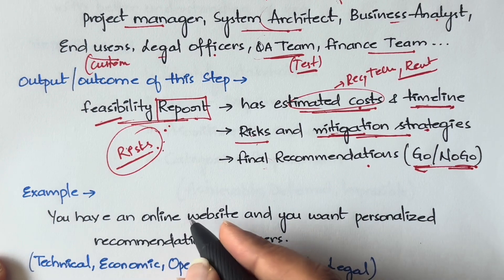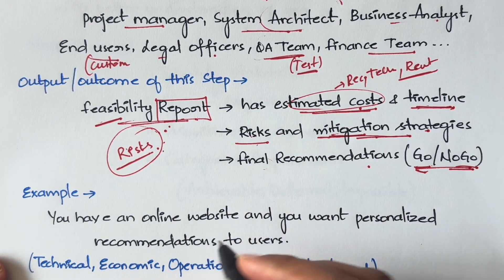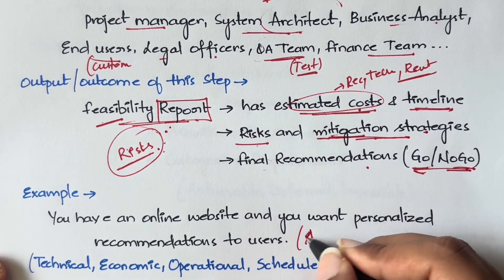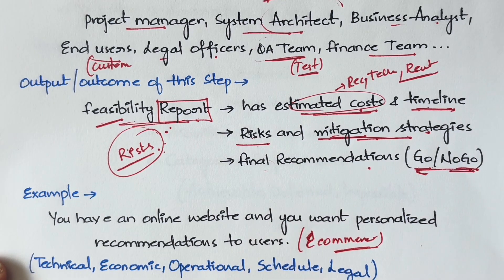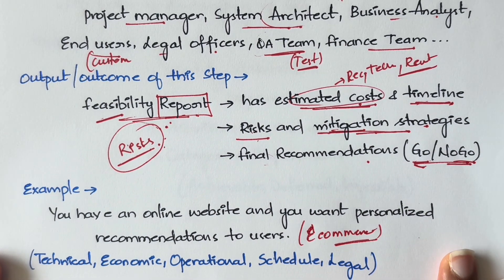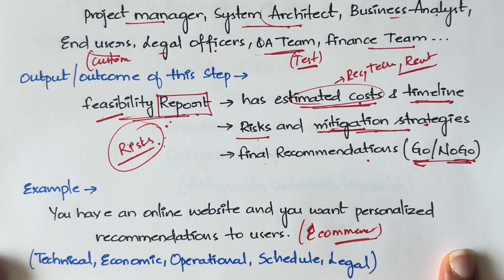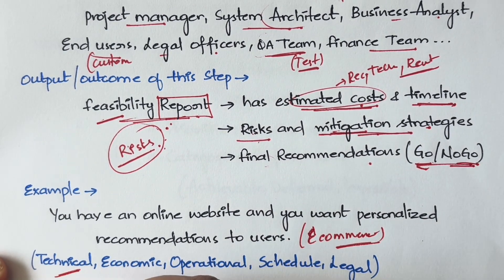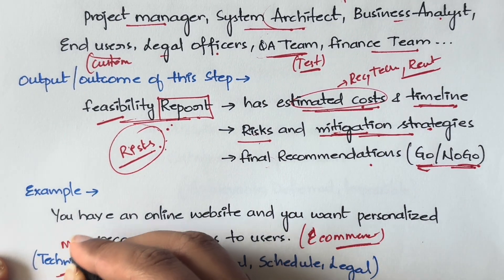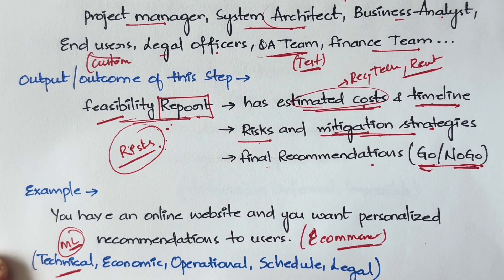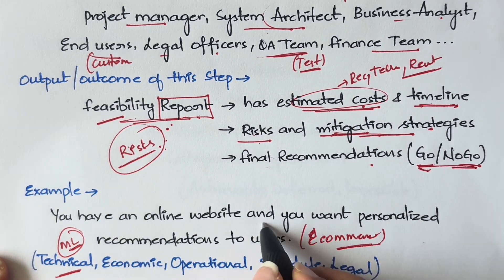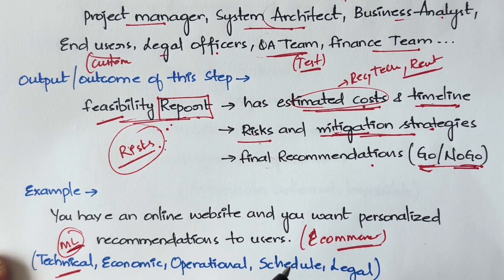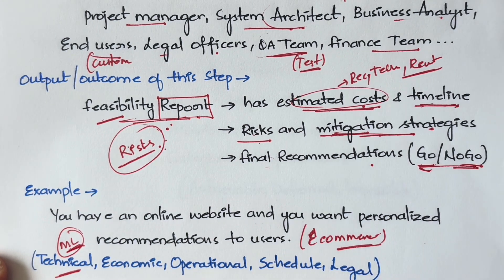As a real-time example, consider an e-commerce website like Amazon or Flipkart that wants to add personalized recommendations — showing users items based on their purchase history, search behavior, or interests. For technical feasibility, you need people skilled in machine learning to implement this kind of feature. The question is: do we have people with machine learning capabilities?